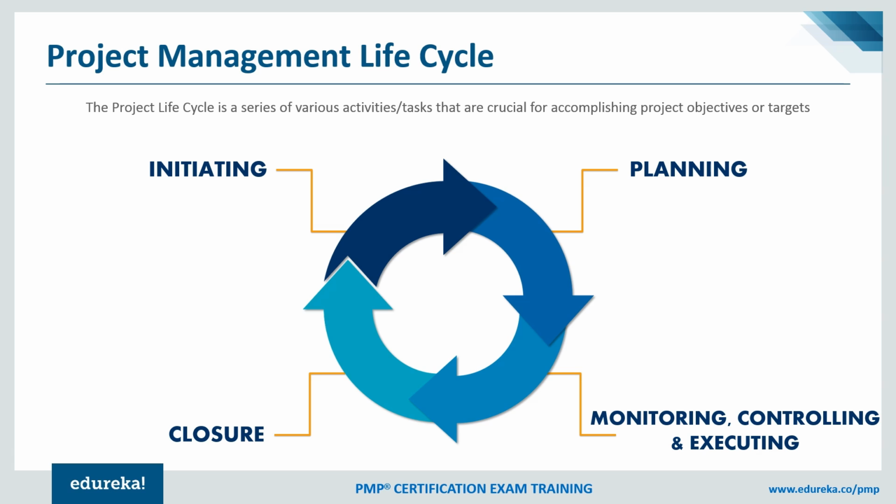Then comes planning. Planning is like preparing a proper plan of each of those items we have to deliver. Planning would also mean talking about the individual knowledge area plans, and also working out the 3 key things, which are scope, time and cost. So we'll prepare their baselines. The baseline means an approved and signed version of scope, that's the scope baseline. Cost baseline is the approved costing of the project. Similarly, you have a schedule baseline, which is an approved time from the management.